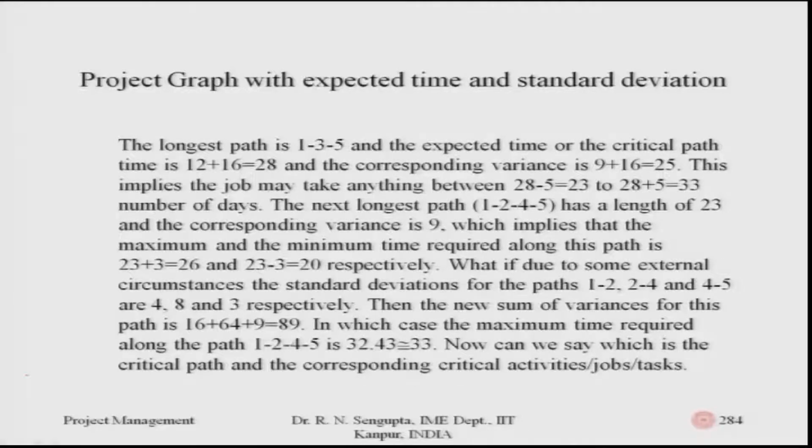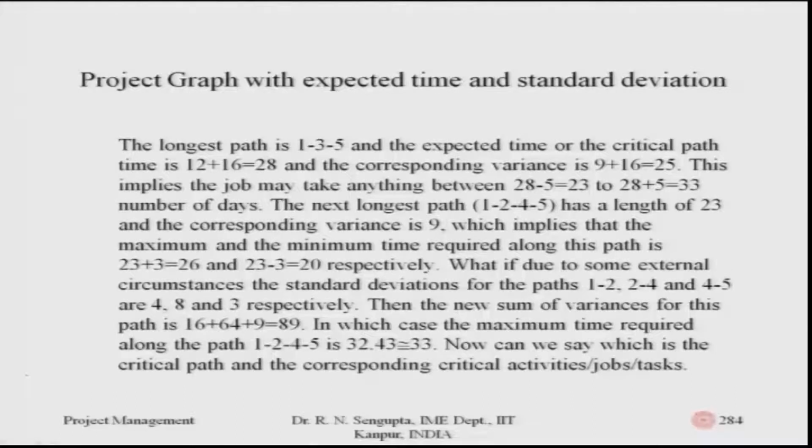So, if I want to find out the distribution, whatever it is, we take the central limit theorem to be true. Now this 5 is one standard deviation. So, 28, which is the average value in between, is the center of the normal distribution, and this is 28. If I go on to the right, that means 5 units to my right, it means one standard deviation plus, the work would basically be finished with the number of days being 28 plus 5, which is 33.